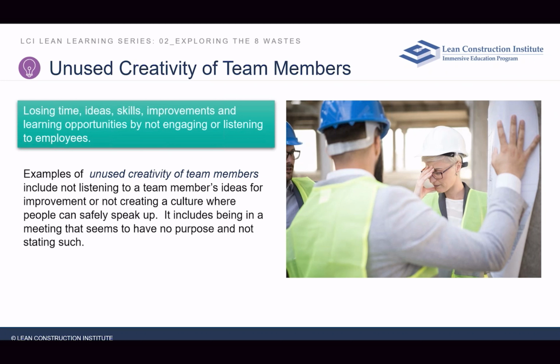We see it when we go to our lean principles of Last Planner and the pull planning concept. We're leaning on the people that are the last planners. Those are the people who are utilizing their talent now. Our superintendents in this concept become facilitators and not dictators. Our project's major overall schedule is a guidepost for us and a framing concept of how we're going to do the project.